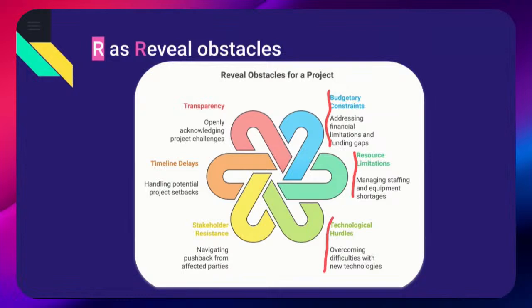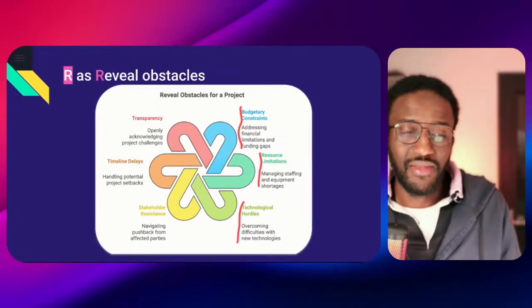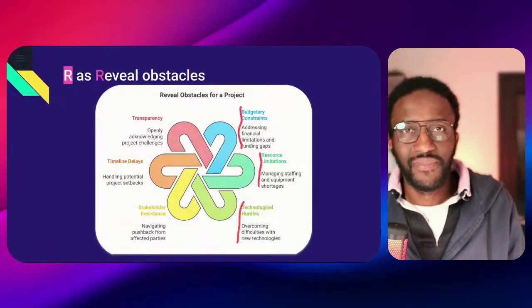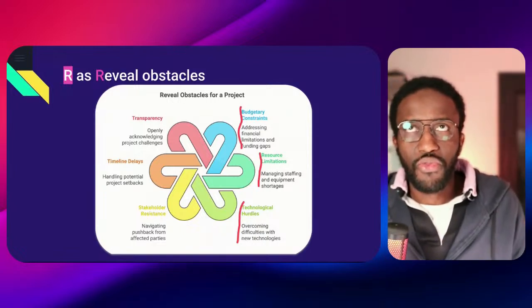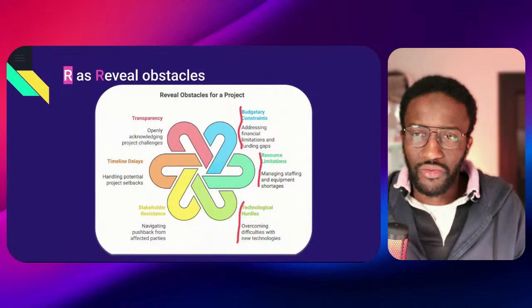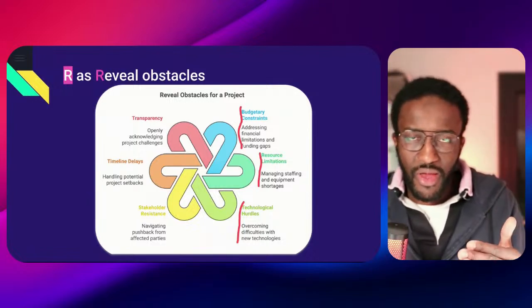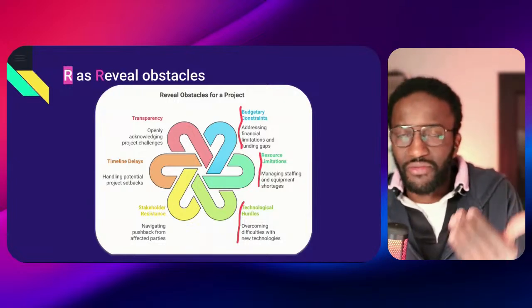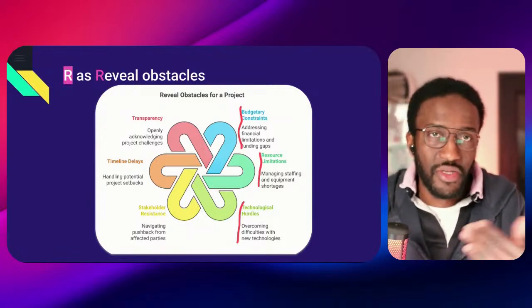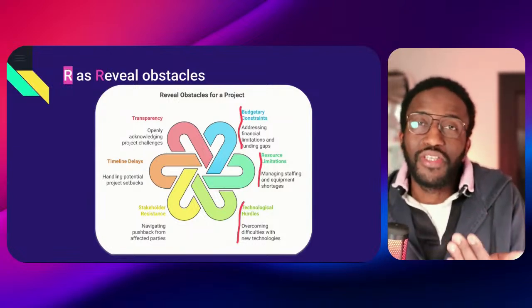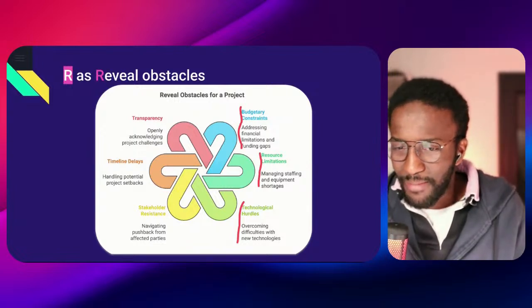As a project leader, the thing that you will spend most time doing is what is called stakeholder management. Basically, it means that you have to try to convince people. You have to spend time trying to embark the people who are already convinced by the project, and the people who are hesitating, you have to try to convince them. And for those who are against, depending on how much power they have in the organization or in the decision, you have to spend more or less energy trying to embark them on that journey.